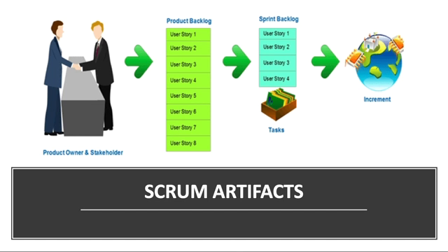The product backlog is reviewed and the high priority elements that can realistically be included in the sprint are then moved from the product backlog to the sprint backlog. Here in the sprint backlog is where the product backlog elements are split into different tasks.